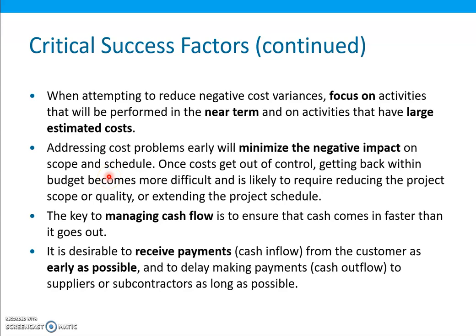When costs get out of control, getting back within budget becomes more difficult, and it is likely to require reducing the project scope or quality or extending the project schedule. The key to managing cash flow is to ensure that cash comes in faster than it goes out. It is desirable to receive payments from the customer as early as possible and to delay making payments to suppliers or subcontractors as long as possible.